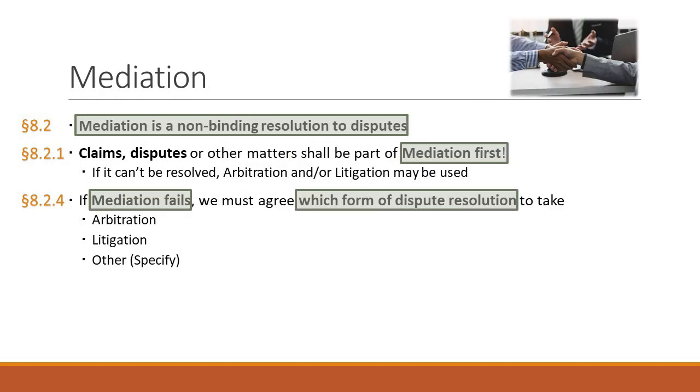Mediation. So, I think we talked about the different ways that you can have dispute resolution. And what the AIA contract has done in the construction industry is this: construction litigation, where you actually go to court, can be very complex and very expensive because there are so many drawings and so many documents. You've got invoices, drawings, change orders, RFIs. The amount of paperwork in construction projects is massive. And so if you could only go to court to solve disputes, it would just be way too cost prohibitive for everyone.